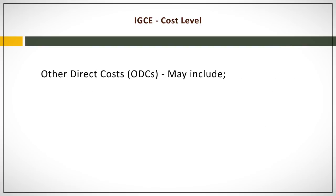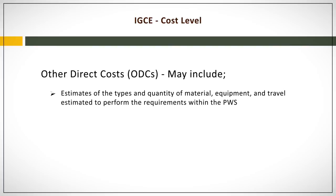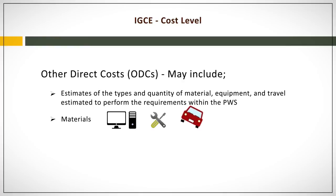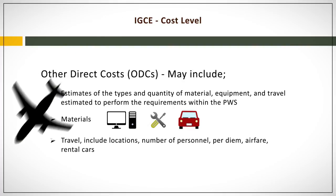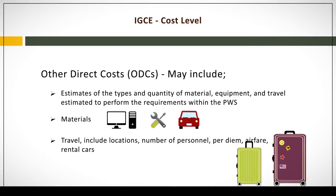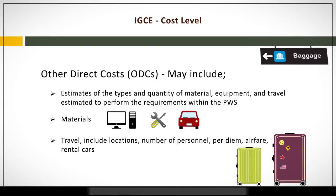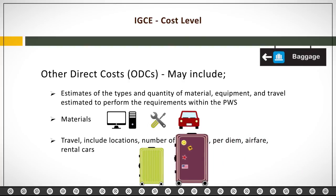The other direct cost, or ODC category, may include estimates of the types and quantity of material, equipment, and travel estimated to perform the requirements within the PWS. Materials used in direct support of the contract, such as computers, lease of equipment, and vehicles, may also be included within the ODC category. The IGCE preparer must provide documentation on all estimates and how they were obtained. When considering travel, documentation must also be provided on the number of trips by locations, number of personnel, per diem, airfare, rental cars, and so on.